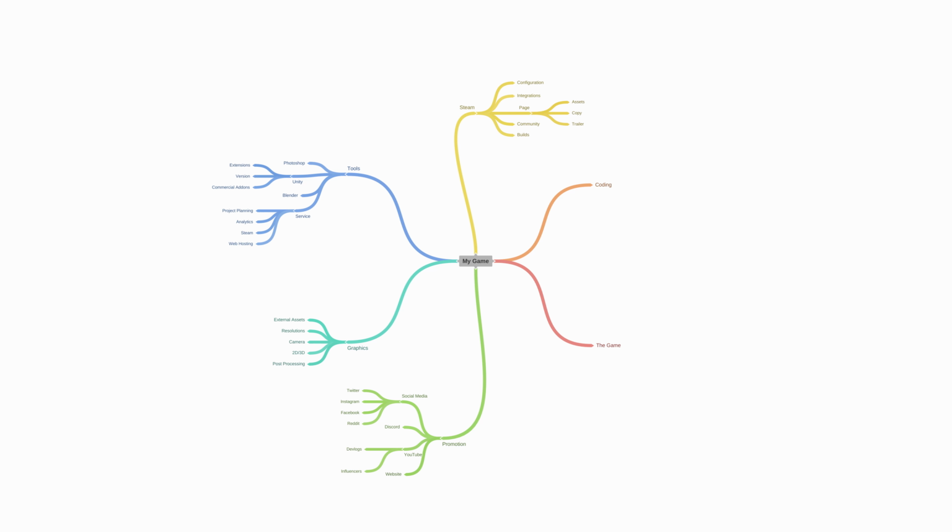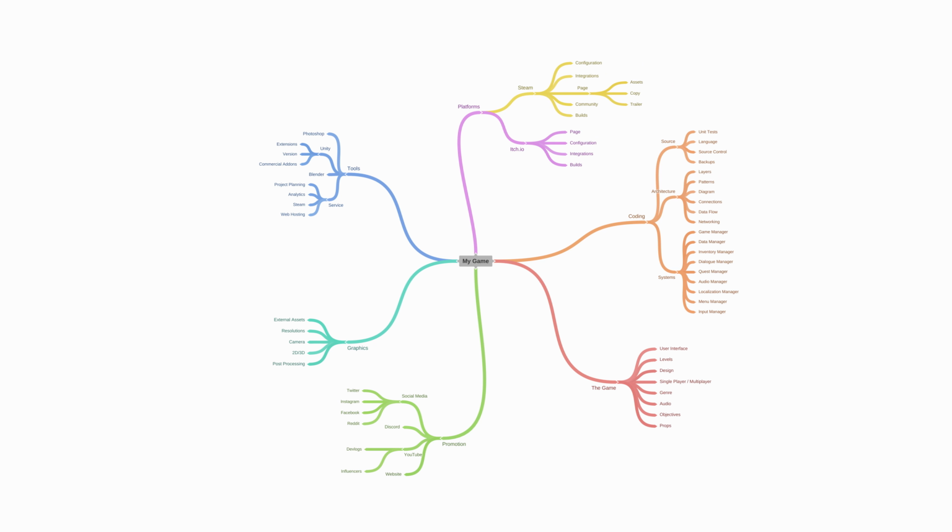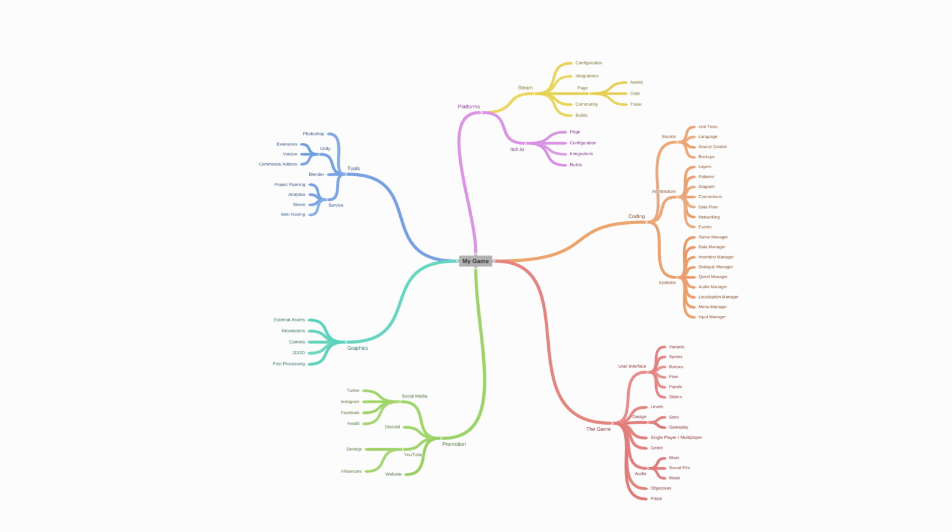There will be not only new ideas, but also work which will require you to learn a tool or do some additional research, or tasks or features that will be more complex than you anticipate. You can't also plan for the number of bugs that you'll have to fix. So all in all, I recommend to embrace that this is going to happen. So when you plan features, always add extra time to account for this.